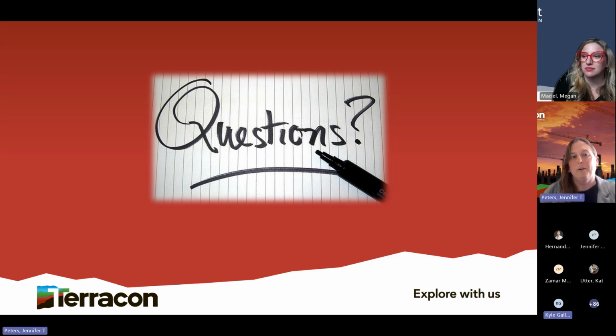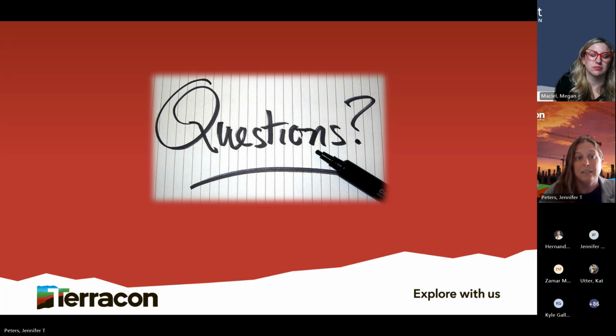Yeah, and so the Corps program managers or project managers who are assigned your permit should have talked internally to figure out, hey, how do we want to go with this? And let's have your 404 process match your 408. Because you could have easily done an EA probably a lot earlier and incorporated the 408 and the 404 together, and it could have been a very quick and easy EA. You could probably remove all your resources and just fully analyze your surface water and your tribal and your cultural and been done with it.